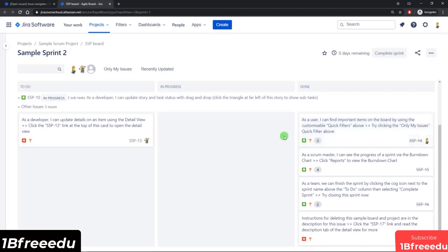If you see that you're moving tickets to your done or completed status and then the issue key is not getting a strike through, that's probably because the resolution field is not being set. So it's definitely something to understand and know the difference. A lot of students ask me what the difference is between status and resolution. So in summary, the status just tells you the state of an issue with respect to the workflow. But resolved, or the resolution field, tells you whether Jira looks at the issue as being open or not. And setting that resolution is something you have to configure whenever your issues reach that done status.